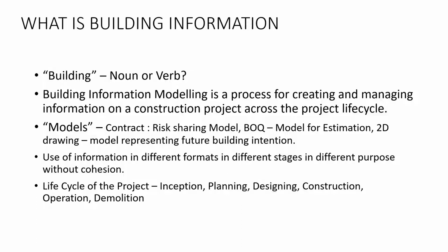So we can create an initial building information model at the design stage. Then we can develop that particular model with information received from our design party. Then we can complete that particular building information model and use that building information modeling even in the construction and the closeout period as well. Then there are a lot of discussions about using these building information models as contract documents. So you have to study the BIM protocol introduced by UK construction.